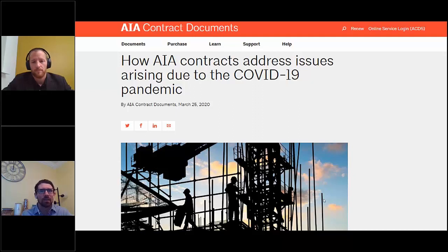For example, if some type of equipment or material from overseas is delayed in delivery, that could potentially form a basis of a delay claim if that particular facet of the job is on the critical path and you can't do anything else until this one type of material is delivered.